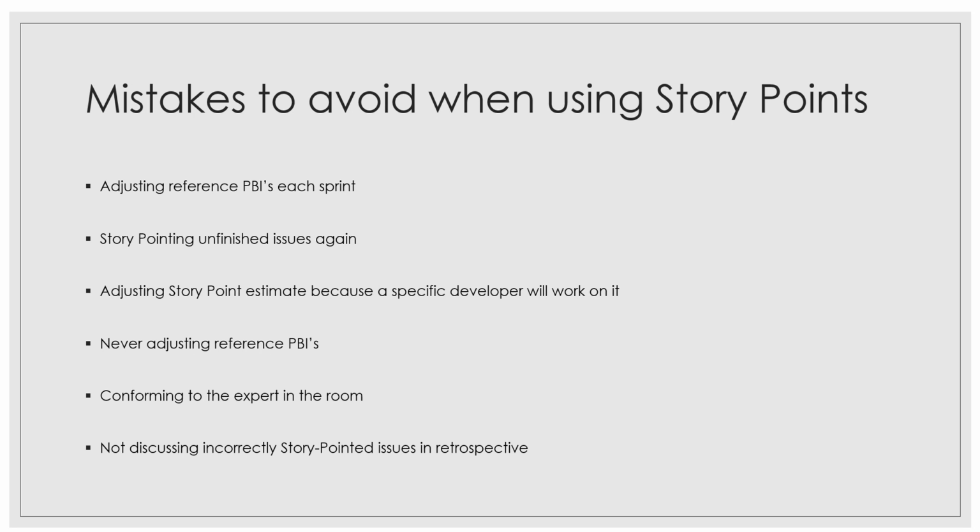You should not be adjusting the story points because a specific person will do the job. Maybe by the time the team starts working on it, the senior developer is working on something else, and maybe the junior developer has to take over. Then again you will face difficulty, and then you will land up in another situation where you are adjusting the story points during the sprint that we have talked about already.